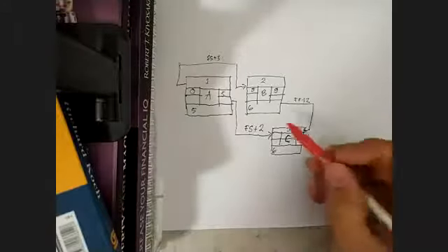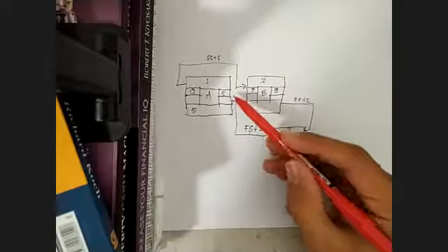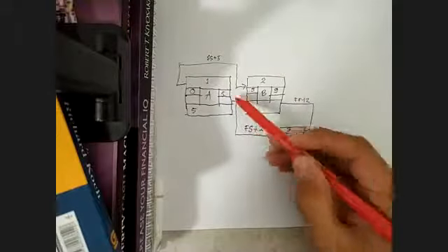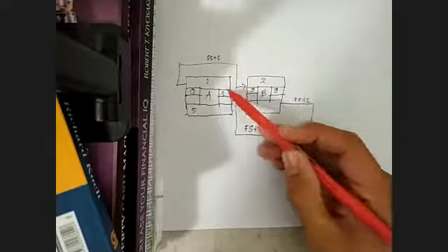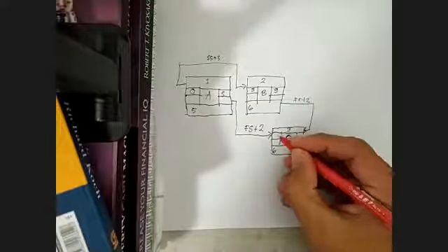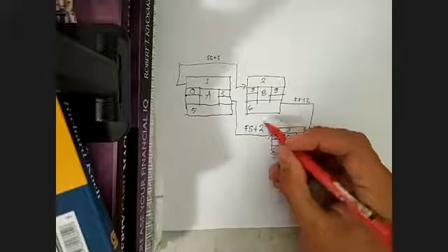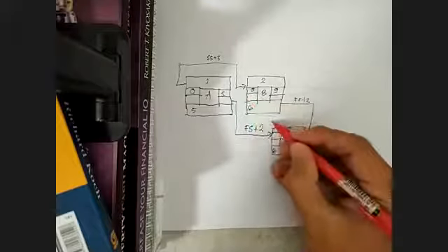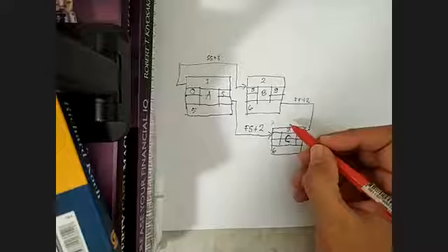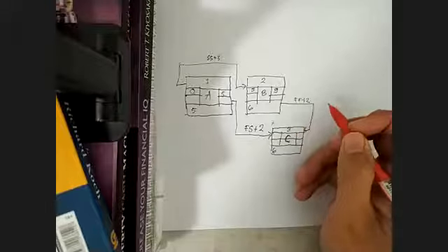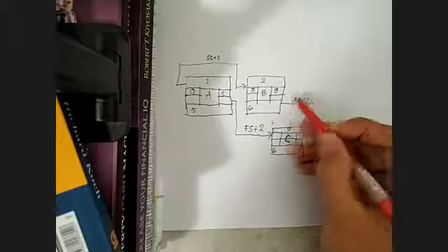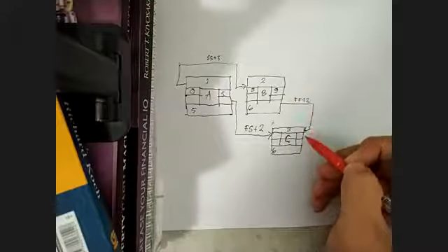Remember, the first step that we will calculate is increasing the number in the predecessor, since it is finish to start. So I will take the number 5 over here, increasing with 2. 5 increased by 2 is 7. After that, what we have to do next is increasing the 9 with 2. 9 plus 2 is 11.